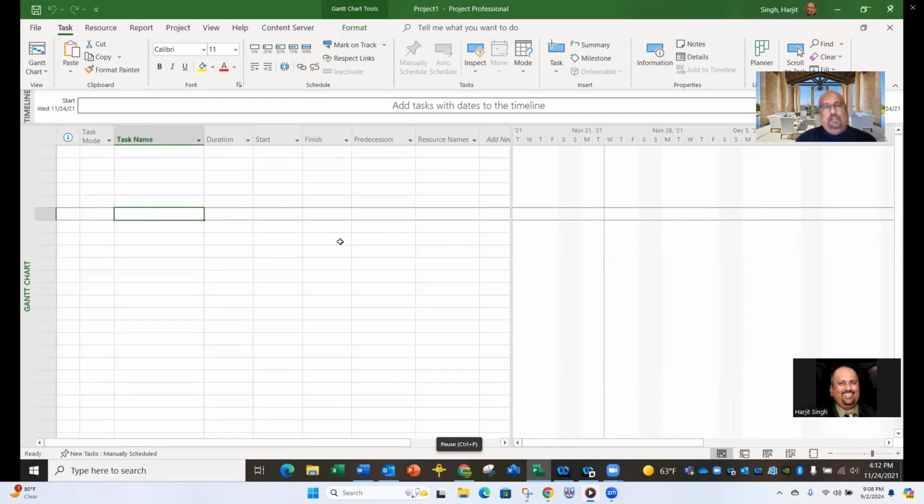So work-pattern structure is a hierarchical, graphical structure. If you draw it graphically, it is a hierarchical structure of the scope, where you break it down into progressively smaller and smaller pieces, until you have manageable tasks that can be managed and assigned to resources, and you can also assign cost and duration to them. So I'll share a little bit with you.